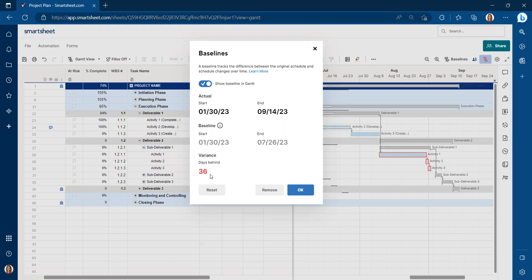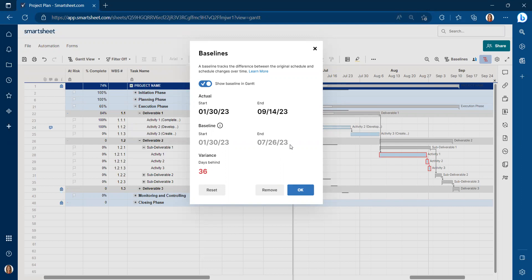It shows that it's in red. The variance is 36 days behind schedule. What we thought we'd be, as far as the project schedule, we thought that we would be finished with activities that are currently finished by July 26 of 23.